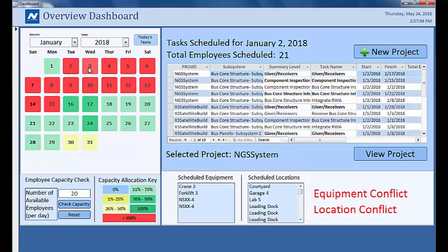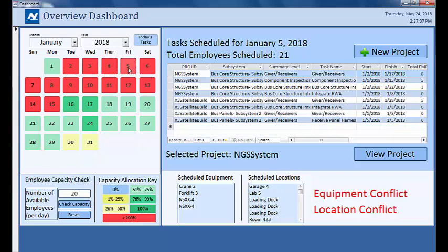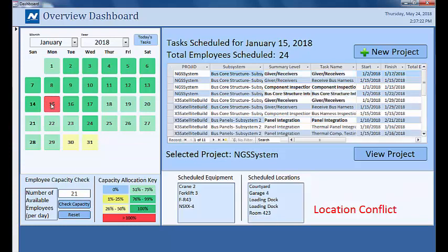The beginning of the month, however, is not as encouraging, with multiple dates strained from work overload. Viewing these dates, it appears as if each day is just one resource over capacity. If the scheduler were to authorize overtime or borrow a technician from another division, we should be able to remedy this problem effectively. And it looks like the 15th does not want to cooperate with this demo.